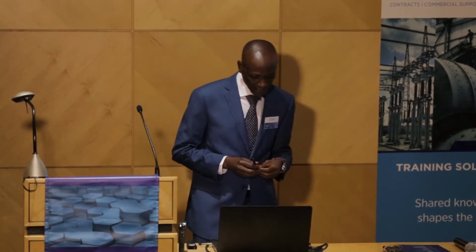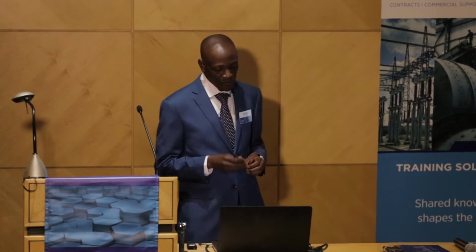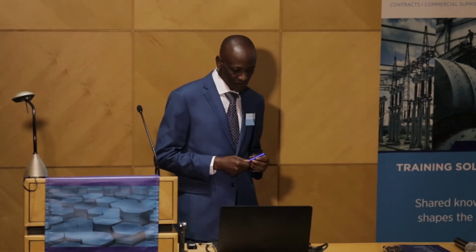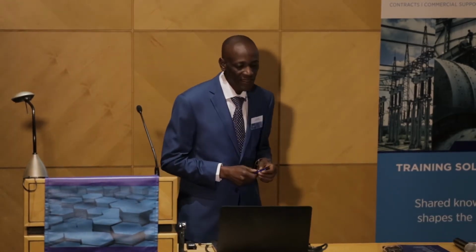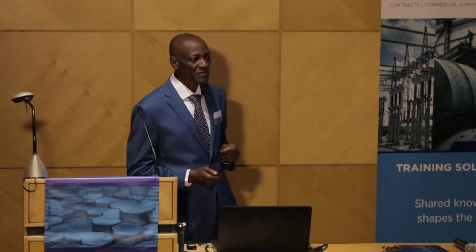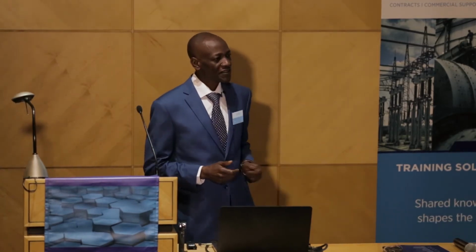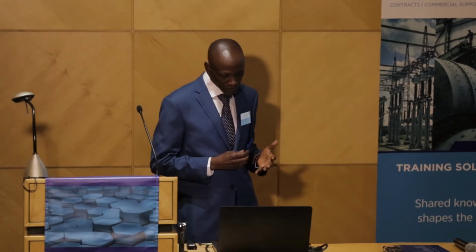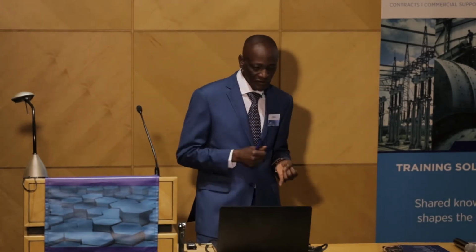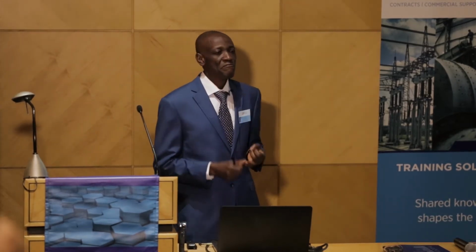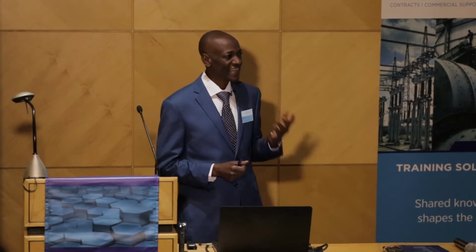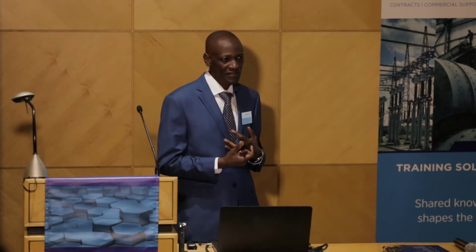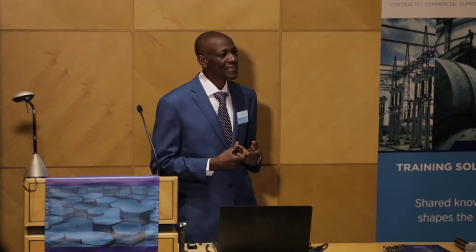If it happens, for whatever reasons, the duty of the contractor is to protect, to store, and to secure the works. It should be remembered that the failure of the contractor to protect and store the works properly may jeopardize his right to claim for extension of time and cost when the work is resumed.